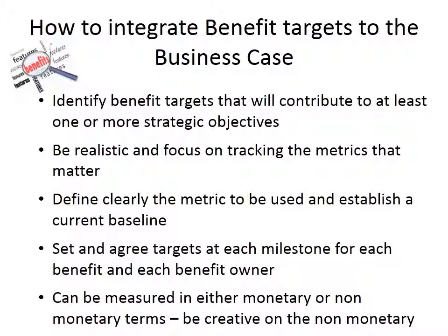We can also identify what is called indirect benefits. Again, it might be more intangible types of metrics, but it's important to identify them and try to find ways, and that's where I say be creative, to capture those intangible benefits. Examples could be end user satisfaction, better access to information, organization image, customer service, better morale, or better brand image. All of those are examples of benefits that are non-monetary, that for me are as important and should be identified clearly with a set target and a benefit owner right from the start in your business case.